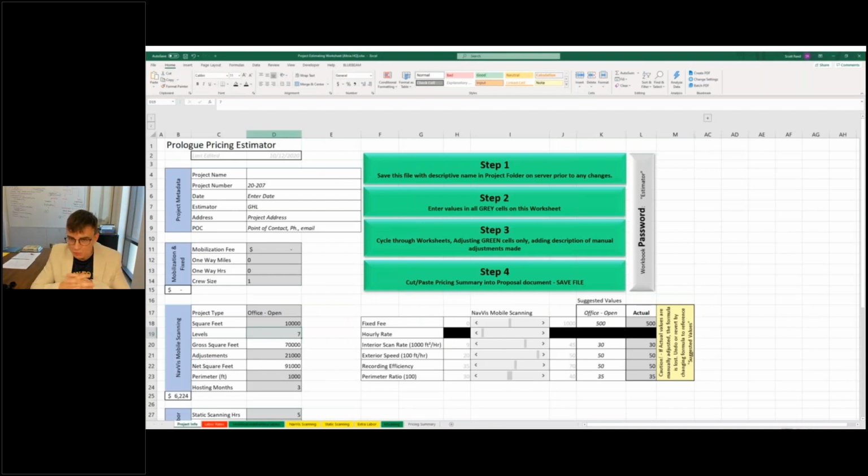After a while, you'll have a tool that will help you price jobs. You enter a square footage, number of levels, maybe categorize the space, and it outputs a total fee. If this kind of estimate makes you a little uncomfortable, well, it should. Do try to gather more information if you can. Ask the client to take some photos of the space. On larger projects, ship them a 360 camera, have them walk the site, capture photos, ship the camera back. These photos will greatly inform how you approach a project.